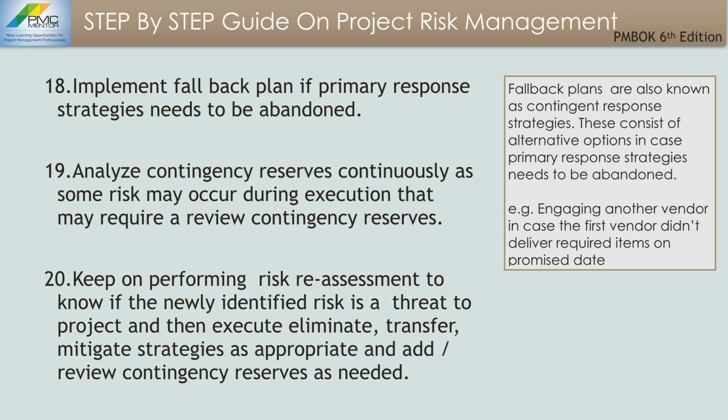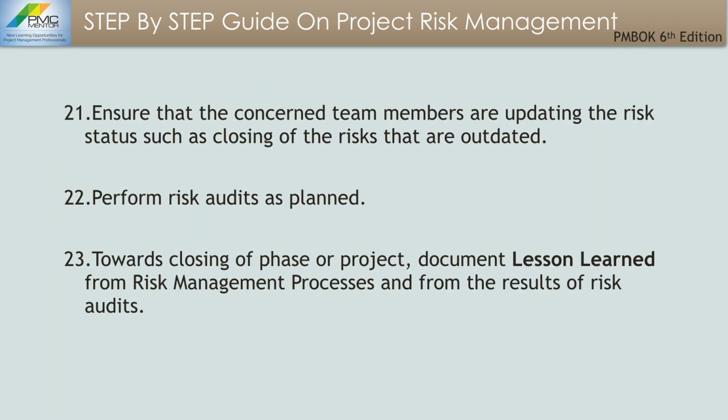Keep on performing risk reassessment continuously to know if a newly identified risk is a threat to project, and then execute eliminate, transfer, mitigate strategies as appropriate and mentioned before. You should review and add contingency reserve or remove contingency reserve as required.